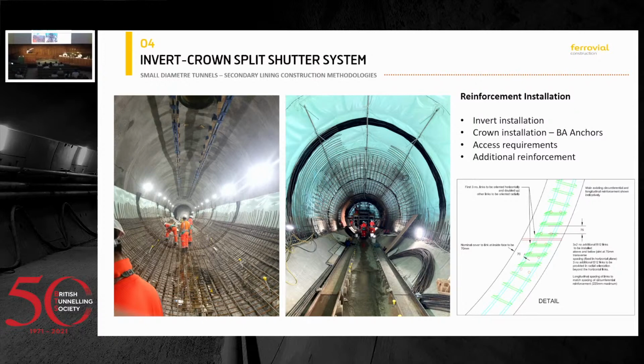As a detail, on the right hand side, that drawing shows a design change that we had to make, because obviously the links go normally radial to the reinforcement, to the tunnel. But in this case, having this construction joint, which would be horizontal, would have a clash or would be less tidy than we would like to. So we changed those links, increasing the quantity of steel to make it more construction friendly.